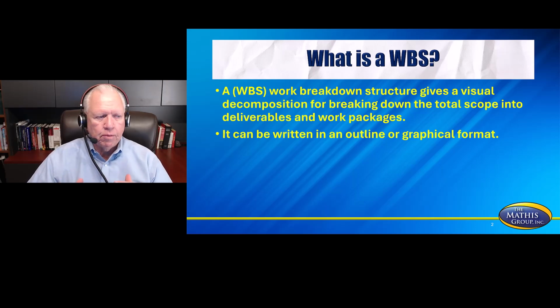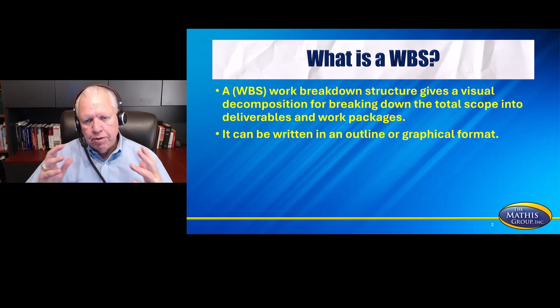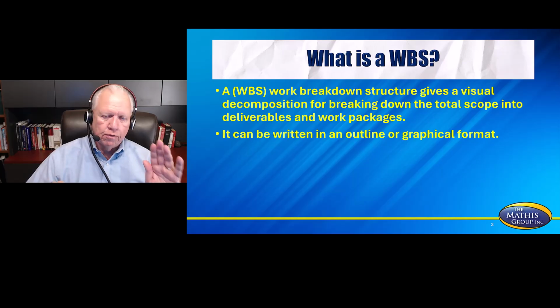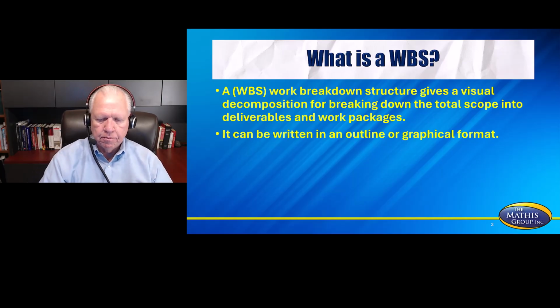Now, the WBS might be something new for many of you because maybe you don't use this or someone else does the work breakdown structure. But in the PMI world, the WBS is one of the first documents right after the charter and after you understand what the scope is that you're going to break down. And this is where you get your initial estimate both of cost and of time.